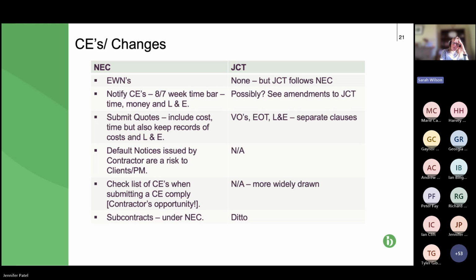So all of this is designed to ensure that the paying party knows what is going on as and when the project is being progressed, because historically we had an issue with JCT where typically you might end up with a situation where the works were completed, the paying party pays the lump sum or pays for the works, the contractor leaves site, submits its final account, and suddenly the price has gone up by 50%.